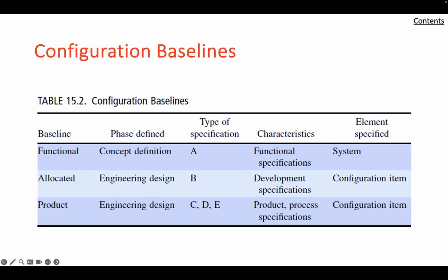Like the components, the configuration item is considered as a basic building block of the system, designed and built by a single organization whose characteristics and interfaces to the other building blocks must be defined and controlled to ensure its proper operation within the system as a whole. It is customary to distinguish between hardware configuration items and computer program configuration items because of the basically different processes used in defining and controlling their designs.